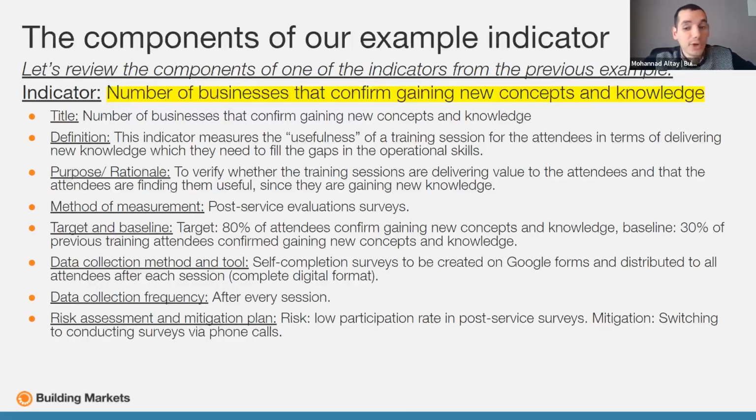Here we can switch to another method that takes less time from the businesses. Instead of sending them a survey that they have to complete by themselves, we can consider calling them and conducting the survey or the test via phone. This can be faster, and because the beneficiary is doing it with a human, there is a better chance that they will be more responsive.